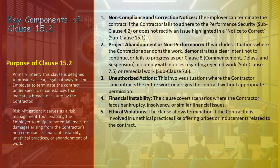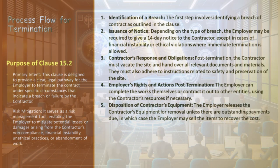Project Abandonment or Non-Performance: The employer can terminate the contract if the contractor abandons the project, showing a clear intent not to continue the work. Non-performance is also established if the contractor fails to progress as per Clause 8 (Commencement, Delays, and Suspension) or does not comply with notices regarding rejected work. It's also crucial to understand the process flow for termination of a contract, which ensures that both parties are aware of the steps to be taken in the event of contract termination.